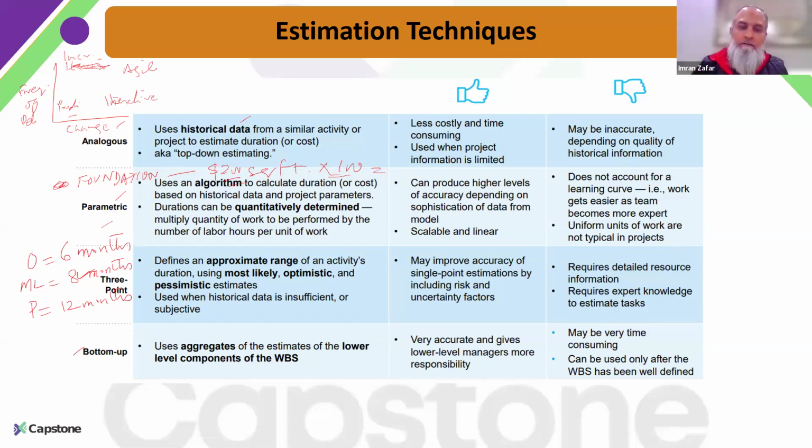Yes, that can be. If you remember the Stacey diagram that we talked about in the first session, the scenario that you are mentioning here, if I understood it correctly, you are saying that the change is not that much expected. The scope of work is very well defined, but maybe you need to deliver it incrementally based on the feedback. Correct. So then that is an incremental methodology.